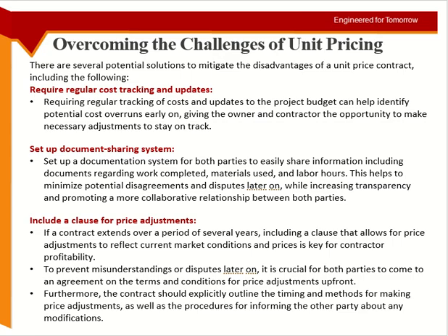He may give you some form with some evidence. So you say, okay, the evidence should be this much, and this will be evaluated by the client, or my manager, or whoever. So the whole procedure should be written. This is what they are saying here. Just putting the clause is not enough. Saying that if the price increases by 2%, we will renegotiate the unit price. How?